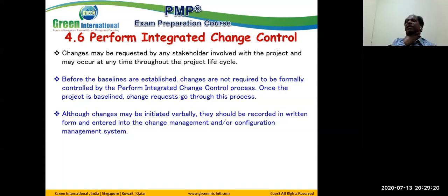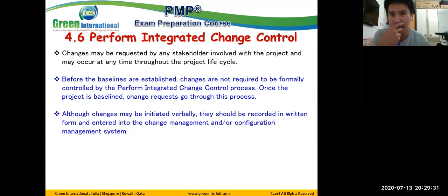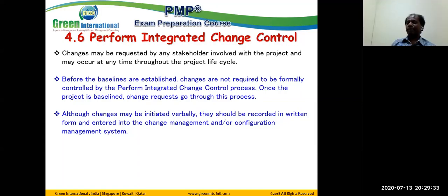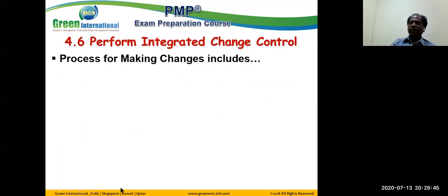When they give you certain items to change, what are you doing? You are doing the impact analysis. What is the impact? How much cost impact, how much time impact, the time schedule impact? It's all part of the change management procedure. You have to do that part. And then with the consultant analysis, all inputs are taken, and then we present to the change control board. That's the step.